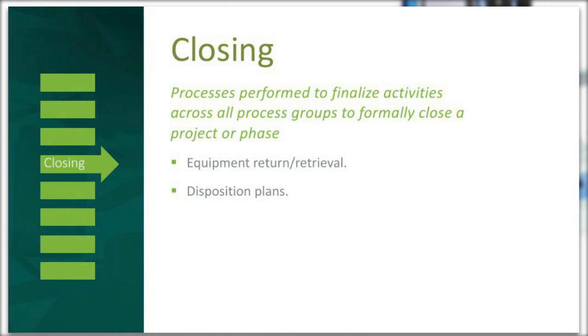And who's going to do that for you? What pieces of equipment are you going to return or have retrieved? And what can you leave there? And where are you going to send it if you have to retrieve it? Do you know what you're going to do with the equipment or the supplies once it's returned? Will you need to destroy any of this equipment? If you do, who's going to destroy it for you? Do you need a letter of destruction? Does it need to be a certified letter?